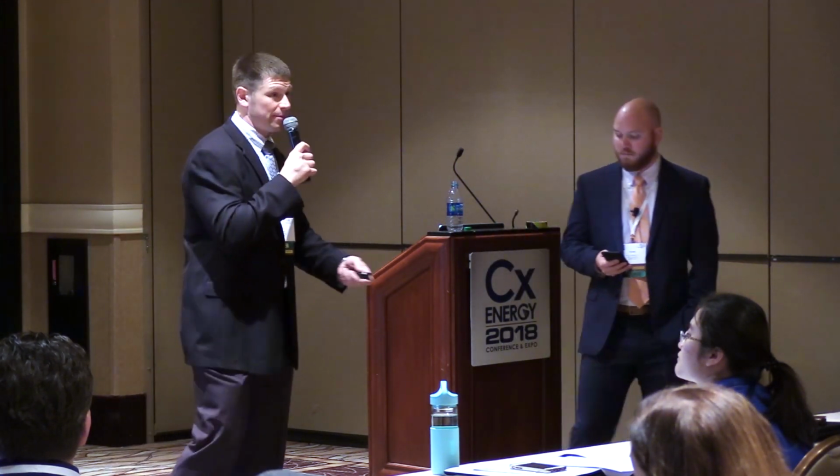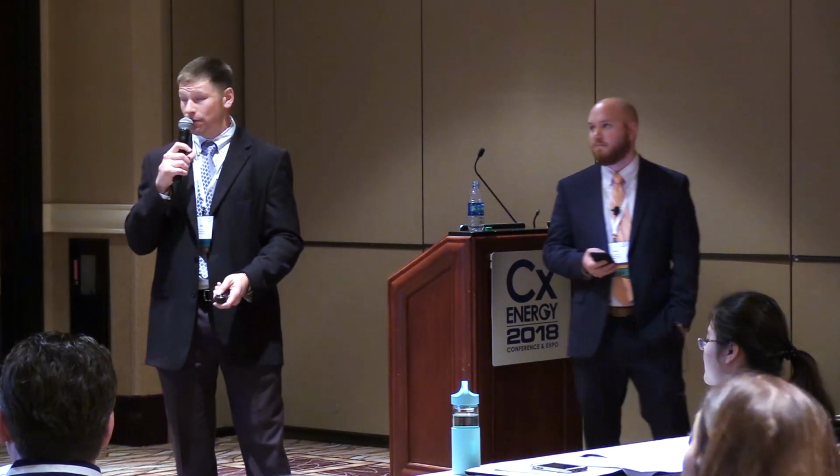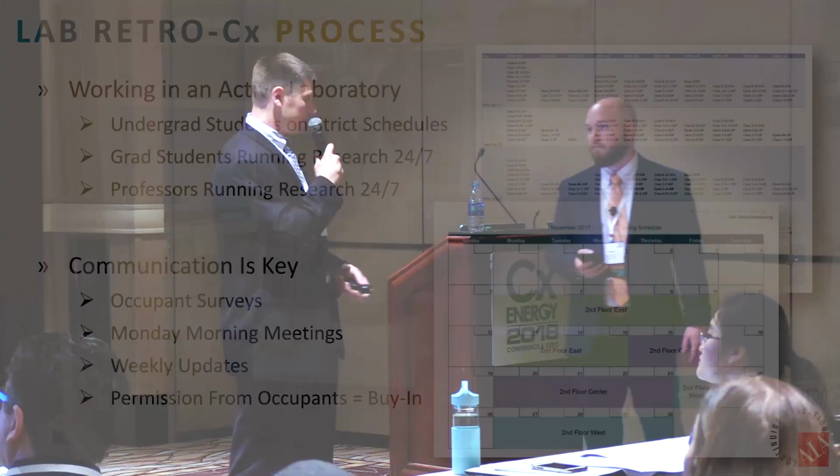The other one had return air, and we're going to talk about some issues that we found where they were renovating spaces and taking administrative spaces, turning them into laboratories, and I'm sure they intended to, but they didn't actually patch over the return air ducts. So they've actually got return air going back to their air handling units from active laboratories. So this is the kind of stuff that we find when we're going through here, and it's really easy to come across some of this stuff.